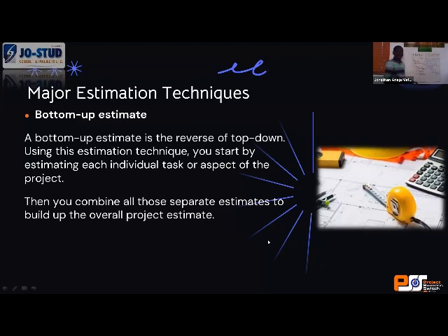If you have broken it down like this, it's easy for you to now dig the trench and ask yourself, how much will I pay to dig the trench? You now look at the drawing. The trench is maybe 200 meters long, and a trench is being dug for maybe 300 naira per linear meter. You will multiply 300 naira by, let's say, a foundation trench of 200 meters.